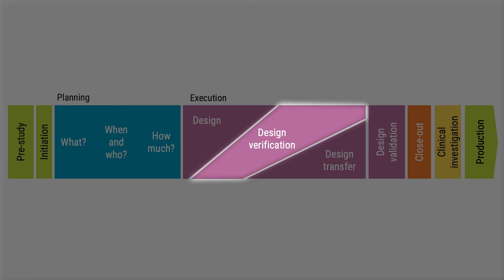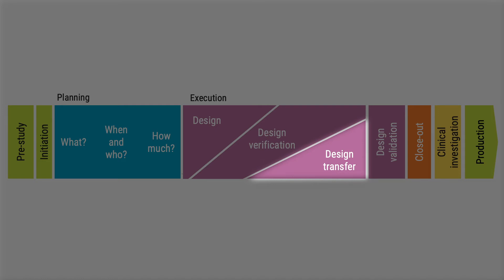This takes us to the next big area of work: creating the capability to manufacture the device in production, which I refer to as design transfer. It includes supplier evaluation, designing the manufacturing process, buying tools, performing process validation, and acceptance by manufacturing. Some companies use different names for this, but using commonly used names facilitates communication with regulatory organizations such as your notified body and the FDA — and that is worth a lot.